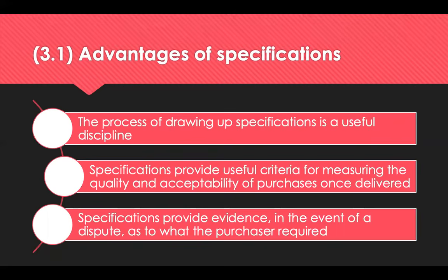So in terms of fit for purpose, the buyer tells the supplier of the purpose the goods will be used for. So for example, if I specified a 5-drawer lockable metal filing cabinet, I would say the cabinet is being bought to store a number of documents that will not fit into a 3-drawer cabinet. A lock is needed because the documents need to be kept secure, and a metal cabinet needs to guard the documents against any potential fire damage. If this was communicated to the supplier in the specification, we could then reject a 3-drawer wooden filing cabinet with no lock if that was what was delivered.